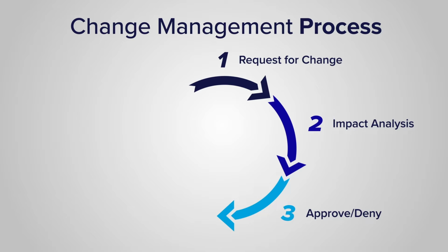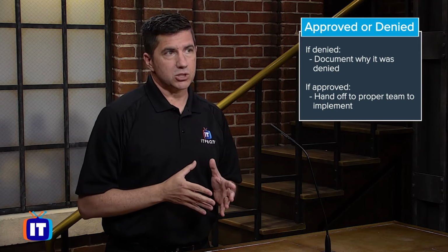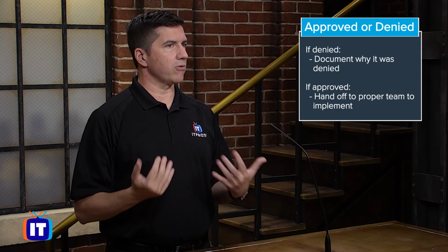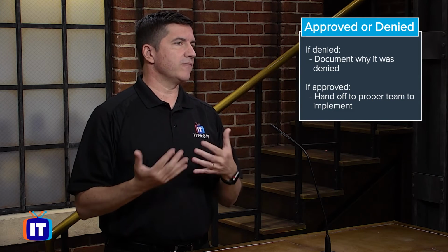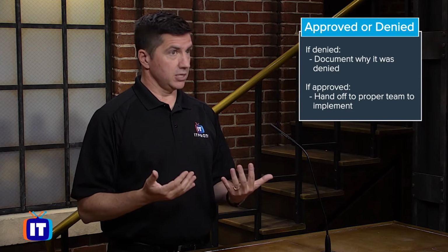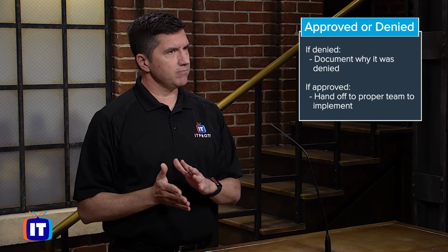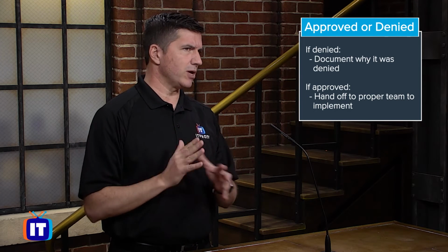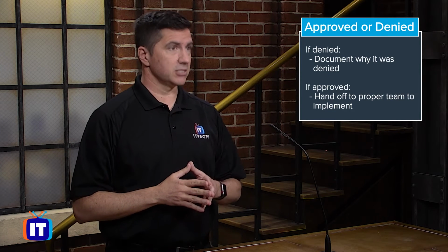Now, if it's denied, it's really important to document the whys of the denial. This is going to help in the long-term projects or delivery of IT services, as there might be someone later on that thinks of the same idea for change. By having all of that information at your fingertips in the documentation, you can decide whether to maybe analyze it again. Maybe some time has gone by, might be wanting to look at that a little bit, or simply point to the original denied decision.